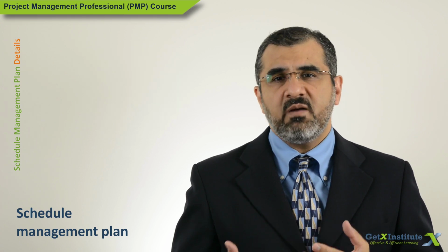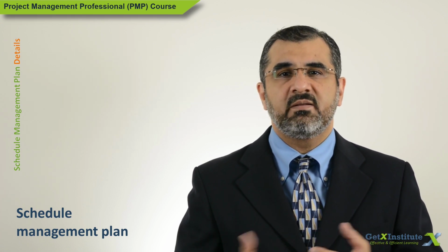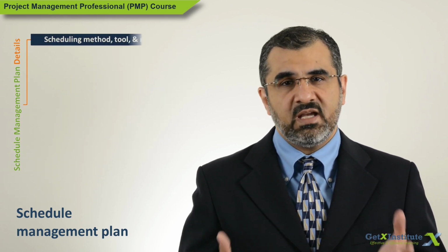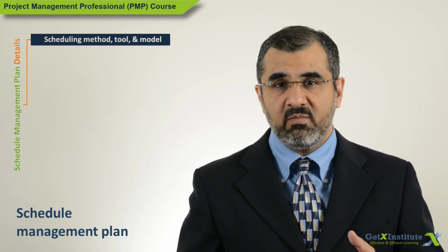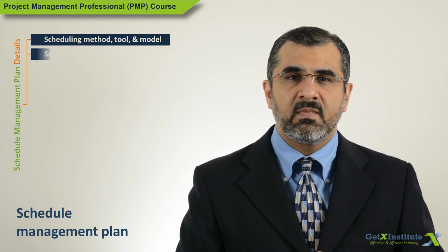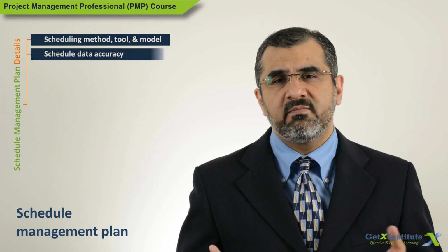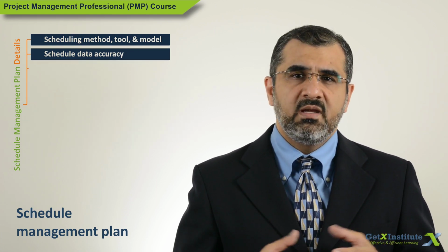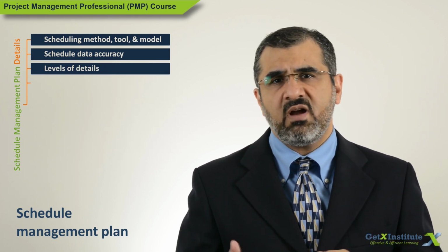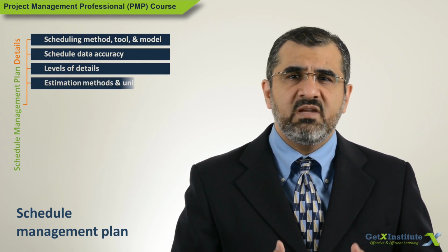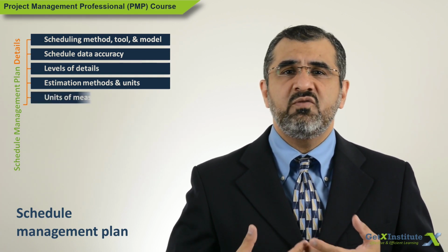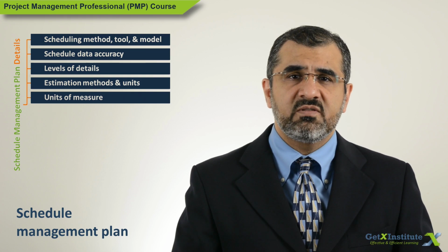Now let us talk about what is in the plan. The plan will identify the scheduling method, tool, and model that will be used. How accurate the schedule is to be. How many details to get into. Should the estimate be in weeks, days, or hours? When to estimate in weeks and when in hours? What are the various units of measure that will be used?